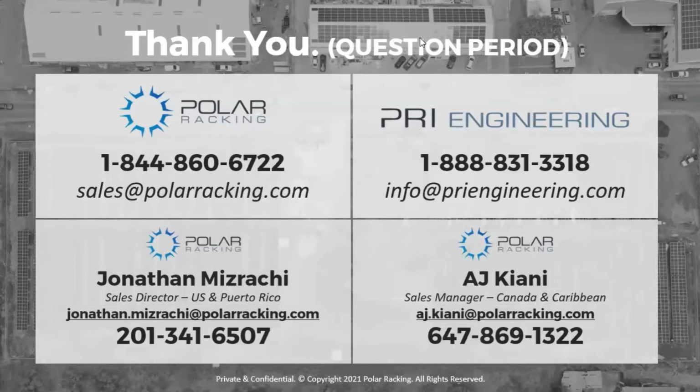It's great to have a great foundation design. It's great to have a great product, but having a competent contractor to put it in and someone representing your best interests on site is key. We feel, at least as part of our scope, which is the foundation, one of your largest risks, that helping to manage that risk by having an engineer on site to review the installation while it's going in is definitely worth the money, because once the foundations are in the ground, it's impossible for someone to walk the site and tell you if they were done right or not.